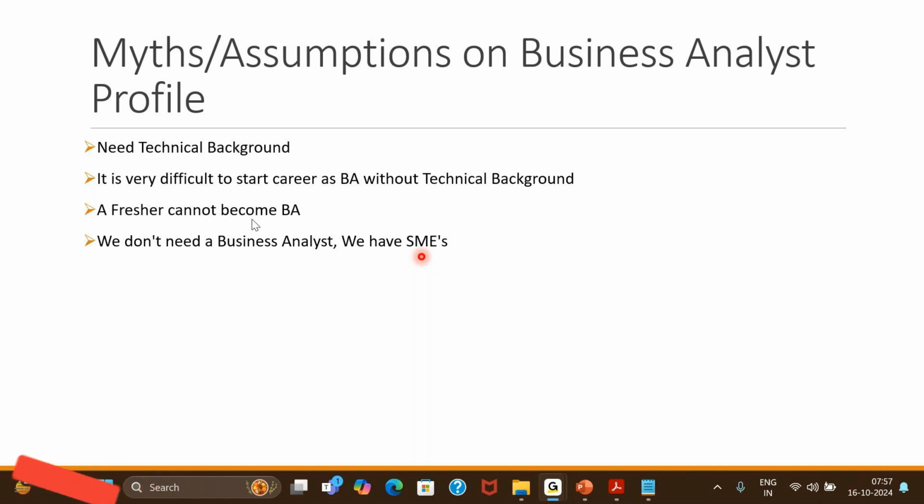While a developer is writing code for the requirement, and a QA is testing that code, I, as a BA, will be working with my stakeholder to gather the next requirement. What is next for our software? What can we further improve or enhance, so that by the time the developer looks for more work, I have the requirement ready.